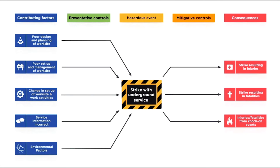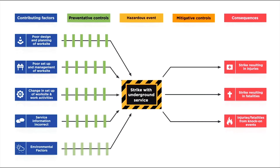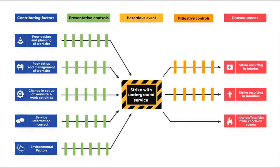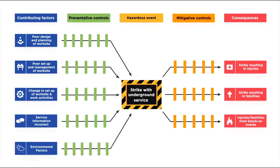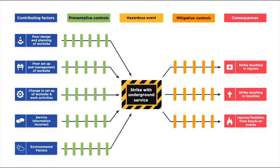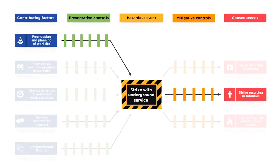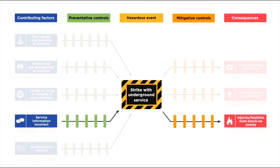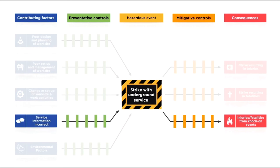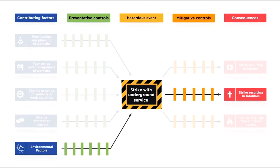Controls are shown on both sides. Preventative controls help prevent a loss of control in the first place. Mitigative controls help reduce the severity of a consequence following a loss of control. The power of a bowtie is that it gives an overview of multiple possible scenarios and a range of controls in a single view, making it easier to understand a risk and how it is best controlled.